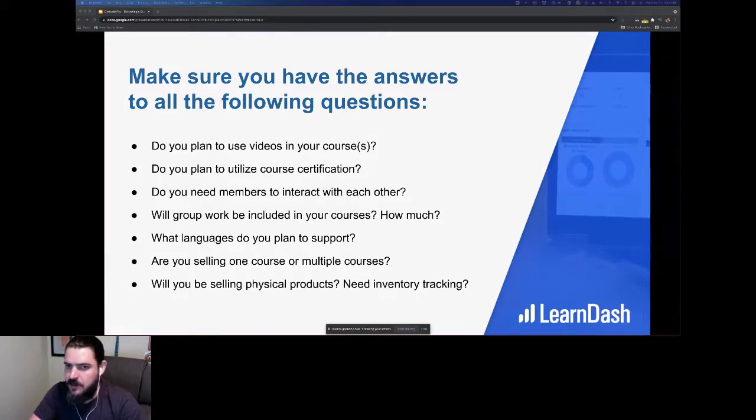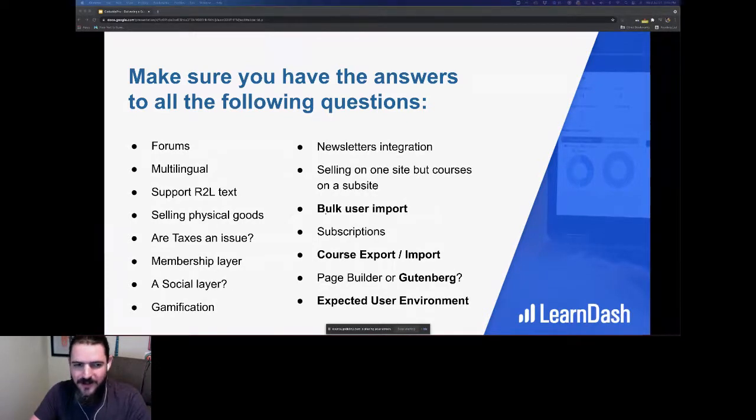Sometimes we have people who just sell one course at a time, and every 3 months they're selling one class, and they sell limited seats. It's just sign up and buy now, and the course starts in 90 days, and then they run that course, and they just do 3 or 4 of those a year. And sometimes people will sell go-at-your-own-pace courses, and they sell many of them. And again, we talked about the inventory, and if you needed something like selling physical goods, books, you would need to be able to add some type of third-party e-commerce solution, which would then take a couple extra days. So just remember, there's always something that can pop up that can give you a couple of little extra days.